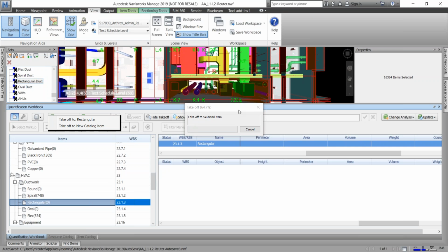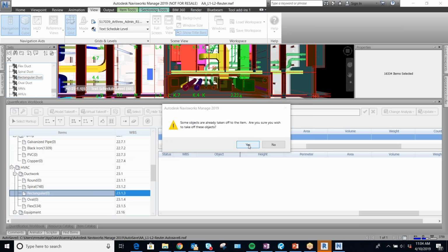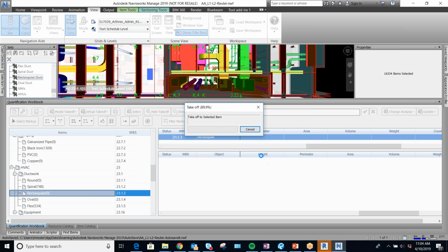So the way that we would probably take off the rectangular duct is you would divide it by the square sheet of the sheet metal, right? So whatever that is, you would divide it out by that. Do you know how big the biggest sheet of metal is that you guys would use? Don't we use 60 by 120 unless they're decoiling for duct? Correct. Okay.